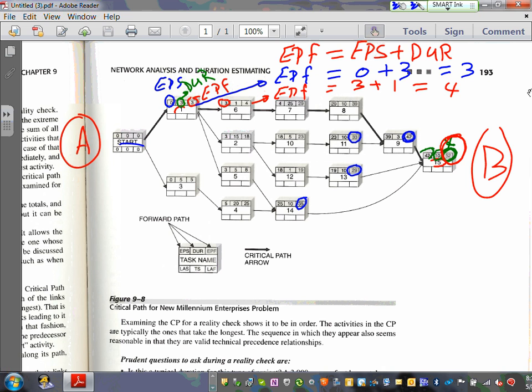So which one is going to decide that this will be my critical path? The 39, because the 39 is coming right here. Can you guys see that? The 39 came from here. Add 3 to it, becomes 42. This is, gentlemen, my critical path.